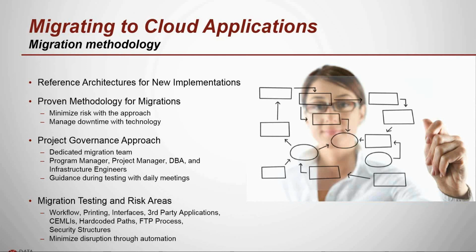One of the best ways we do that is by taking the initial migration and putting that on the infrastructure that will eventually be a customer's production systems. So as you go through testing, you're actually testing on what will be your production environment. So you know what the end performance result is going to be. You know what the user experience is going to be. And when it comes time to do the final migration, we're able to basically go through and do that such that only the data is being refreshed.